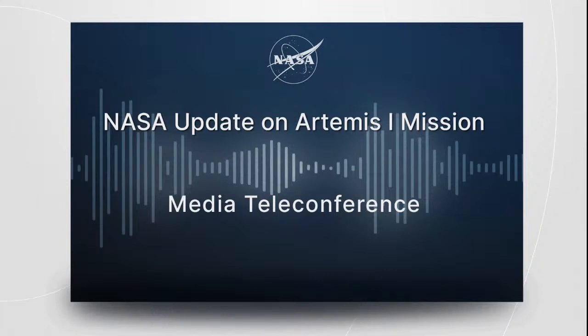Yeah, hey, Mike. I'll add just a couple of things. Like you said, from an SLS standpoint, we haven't fueled, but we will fuel as a part of the launch countdown sequence. And then if we were to not go on the first day, we have a 48-hour scrub turnaround capability, and then we would have a third launch attempt 72 hours after that.